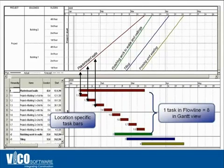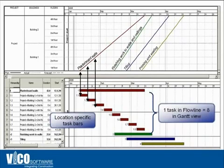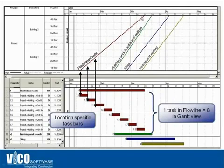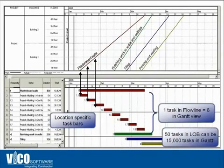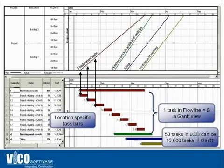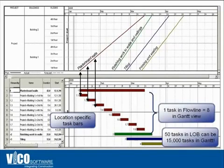With this technology, you also reduce the number of links embedded in the schedule, because the location sequence and location logic are automatically generated by the Flowline view. Continuity of locations is ensured by having a continuous line without any break, and the logic is automatically handled by the program. You only need to take care of predecessor and successor links, which reduces the number of links by an order of magnitude and helps you manipulate and resequence the schedule as many times as needed during the pre-construction process.